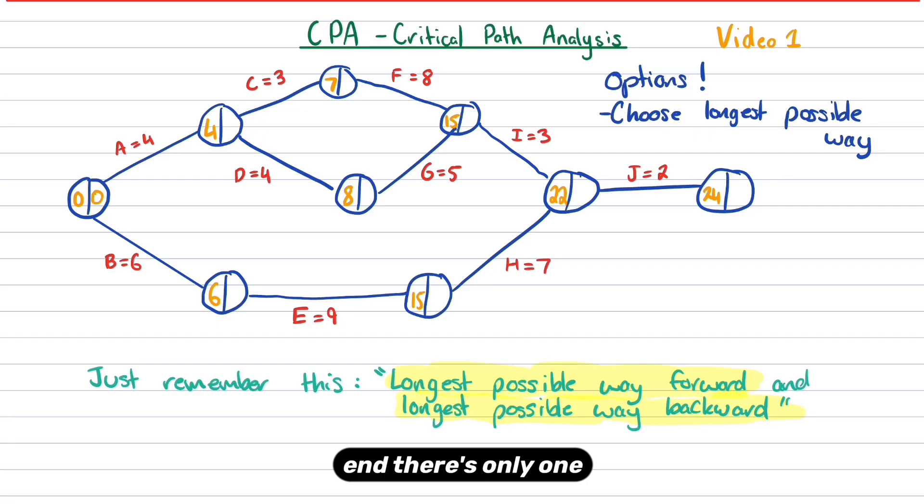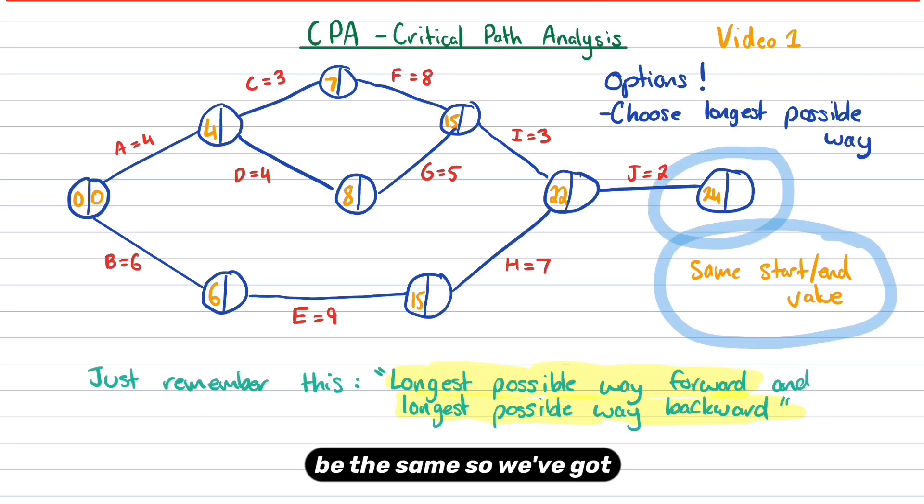And then obviously to get to the end, there's only one option. So 22 plus 24, sorry, so 22 plus two is 24. Now at the end, the start slash the end value will be the same. So we've got 24 and 24 at the end.